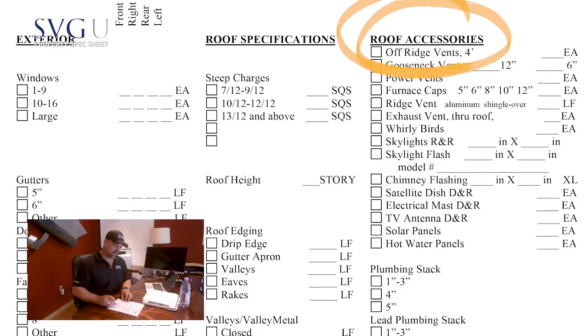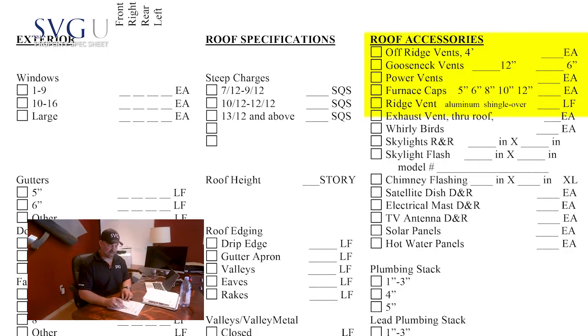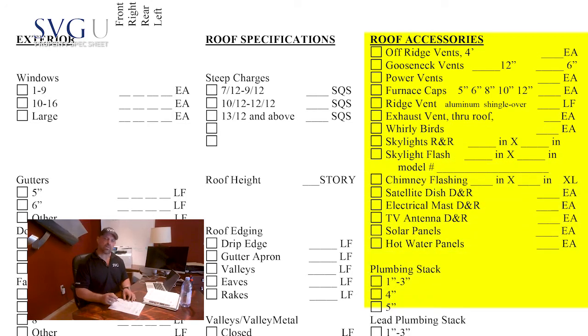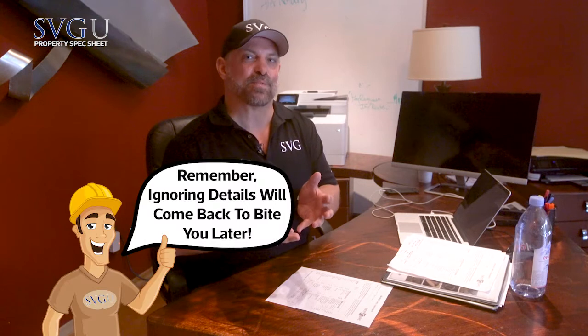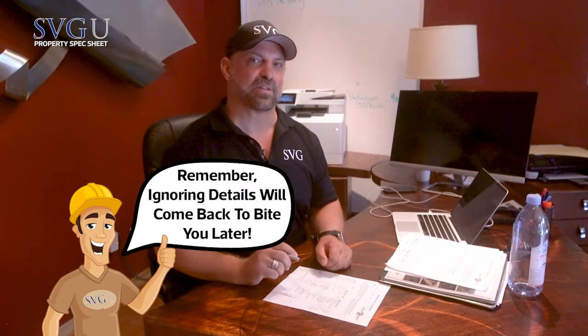Another big area is roof accessories — power vents, furnace stacks, four-foot off-ridge vents, furnace caps, whirly birds, skylights — all this kind of stuff is difficult to see on that satellite image report. If you don't mark them down, not only can you not estimate or supplement for those items, but your production manager later on is going to order the wrong vent systems, causing a trip charge and a roofer to stop production and someone to go back out to that job site several times, which is a real pain.